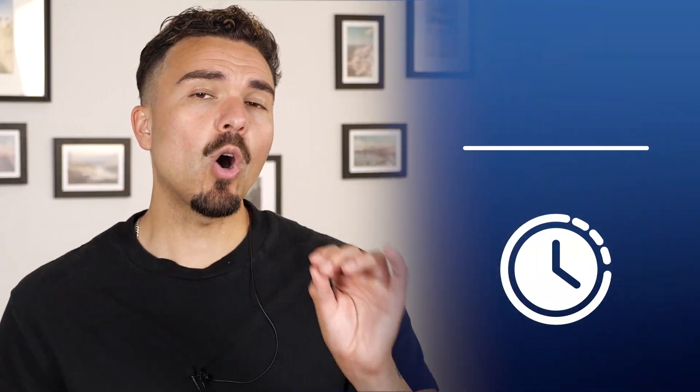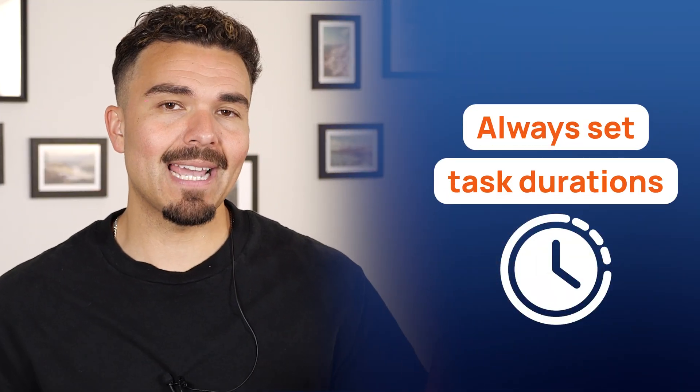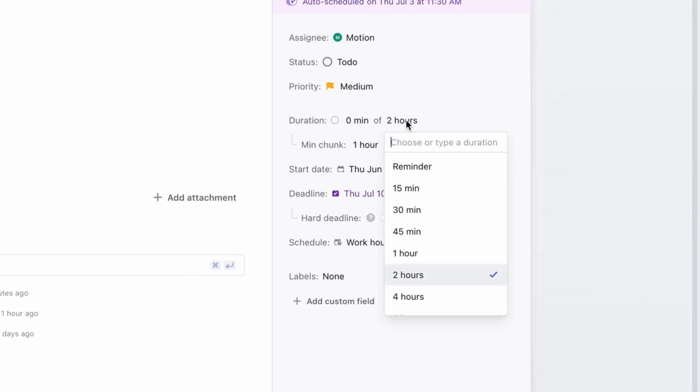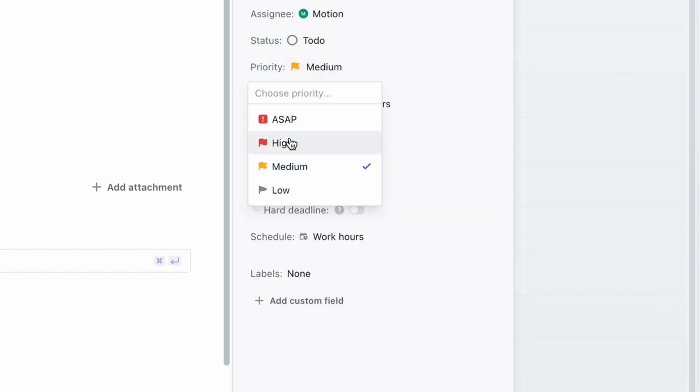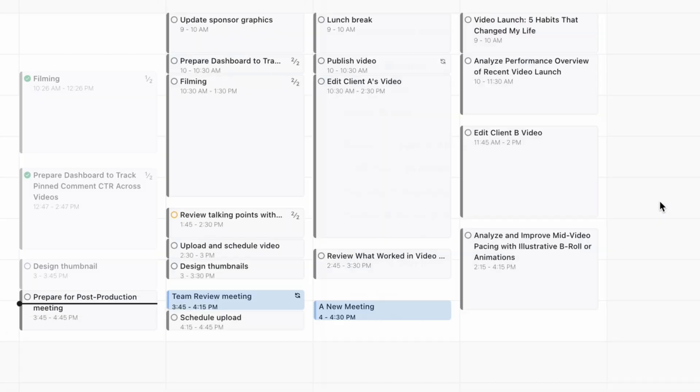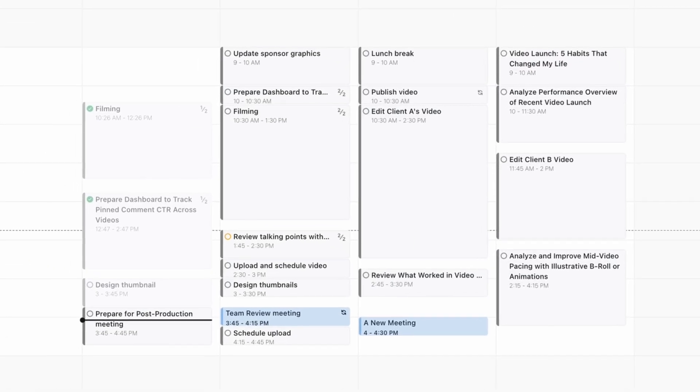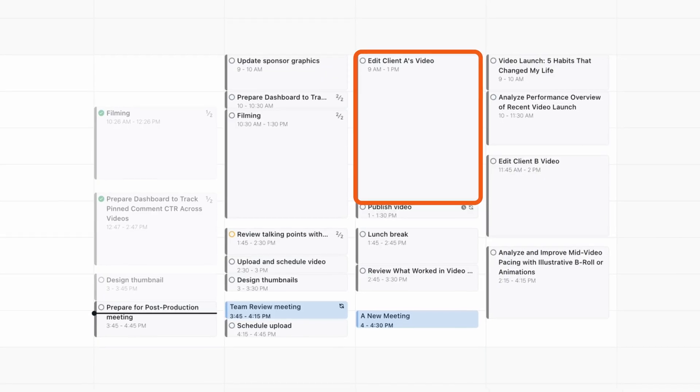Before we wrap up, here are some quick tips on how to use Motion like a pro and why it's one of the best productivity tools for project managers today. First, always set task durations — if editing a video takes 4 hours, don't skip the time estimate. Motion uses that to plan your day more realistically.